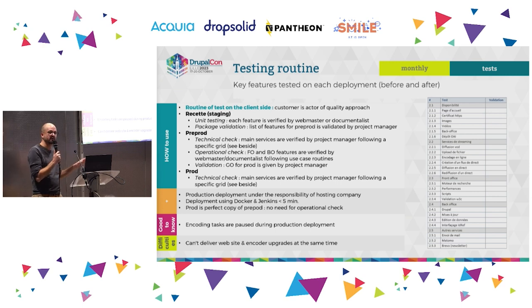And also, a last word about the encoding service, because it adds some complexity to this process. For example, when we want to make a deployment on production, the day before, we have to launch a script that we developed. A script that pauses the encoding tasks, because if we make a deployment in production when there are encoding tasks running, we could have database conflicts. So we also have to deal with this.